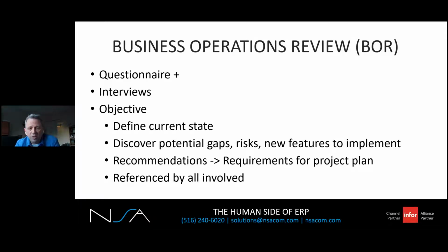The BOR also generates recommendations, often lots of them, for improvements. Some may be optional, like maybe you should use the bank rec feature in the new CSD, or some mandatory recommendations, such as your BI doesn't work with CSD. So these recommendations will make up a large number of the tasks on your resulting project plan. The BOR process also discovers potential gaps between your system functionality and your needs, identifies project risks, as well as new features to implement. Once the BOR is complete, it's presented to the executives so they get an idea of what this project entails.